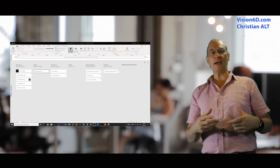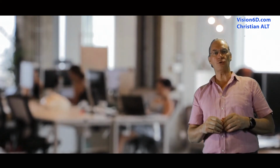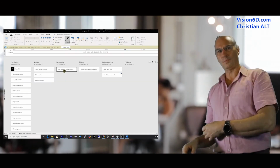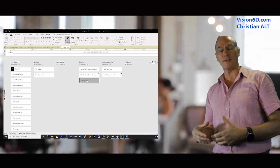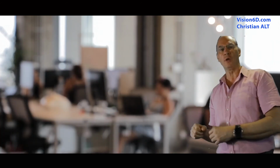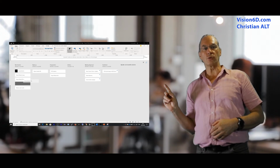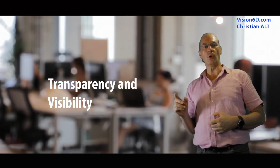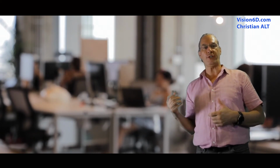Kanban is really looking at accumulation of work, and we are trying to reduce those spots where there are accumulations. We are trying to understand them and how we can improve those. We are in a pull situation where the team member, once he is done with certain tasks, can pull additional ones. We are not in a push situation where we push the work to the coworker. The table gives a really clear situation of the tasks and the state of the project. Kanban is really known for the transparency it gives to the actions, to the items on which people are working.